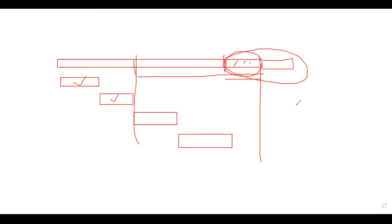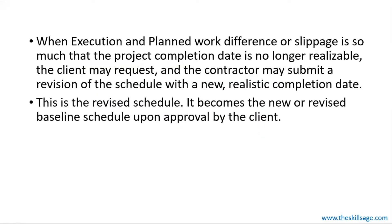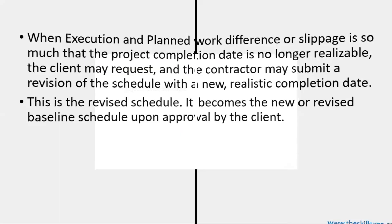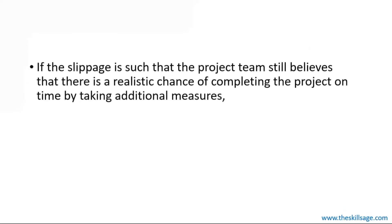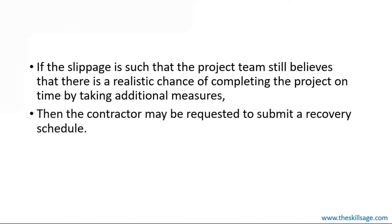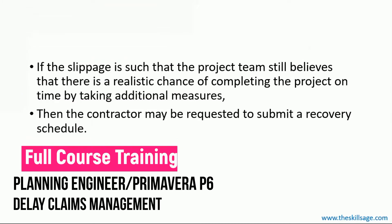The revised schedule becomes the new revised baseline schedule upon approval by the client. Once approved, it will be saved as a new baseline. If the slippage is such that the project team still believes there is a realistic chance of completing the project on time by taking additional measures, then the contractor may be requested to submit a recovery schedule. In both cases, one thing is common — the client will be given a plan, either recovery or revised, submitted by the contractor.